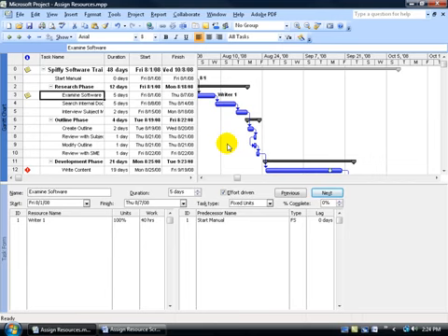Again, the top pane hasn't changed, it's my Gantt chart, and down below it split it into the resource view. And you'll notice that my Examine software, what I have selected up above, gives me a more detailed view down below. It gives me the Examine software again, its start and finish dates just as you see it here, but it also gives me the resource name, the percentage of units assigned of that resource to the task, which is 100%. He's giving it all 8 hours a day, and he's going to be working 40 hours, which makes sense because it's going to take 5 days to complete this task, which starts August 1st, the previous Friday, and goes through next Thursday, August the 7th. Okay, so I get more details of what I have selected up above.